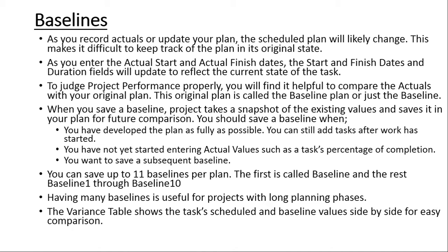values with. When you save a baseline, MS Project takes a snapshot of the existing values and it saves it inside your project plan. So in other words, your baseline is not a separate file, it is actually saved inside the same project plan. In order to get a good baseline, you should only save baselines when you have developed the plan as fully as possible.